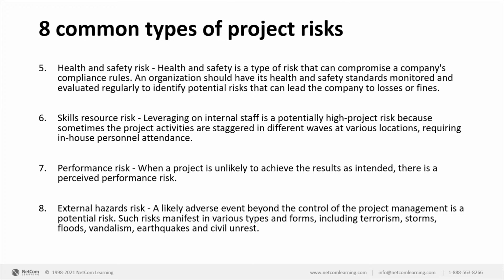Skills-related risk, uncertainties related to finding the right people with the right skills. Now, technology is changing on a regular basis. Finding the right entity who understands that technology to the extent that you actually expect them to. Let me give you an example. You need a programmer, but how good is this programmer supposed to be? Is the kind of programming you're expecting a very general, basic kind of programming, or does it actually require someone to write down those codes? That's going to be something which can introduce uncertainties to your project.